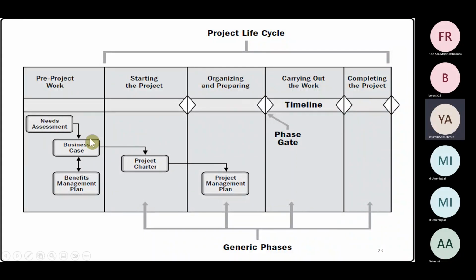That can then be captured as a part of the benefit management plan. Once this is agreed on the business side, these two documents are prepared by the business sponsor. The sponsor will work on the business case and the benefit management plan and give them to the project manager.